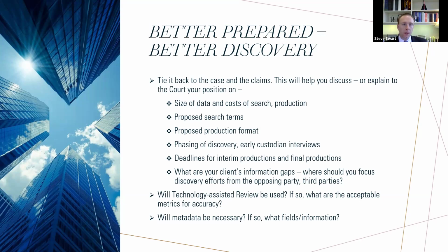That may be helpful. So again, you don't have to know every relevant document going in, but if you have a chance to do some iterative search, some practice search terms on the data, or look at what formats may be less costly. Does it make sense to phase discovery? Maybe we do discovery of, think about a loss of productivity claim, maybe we're looking at accounting records for this project and then expanding it to a broader portion of the database.